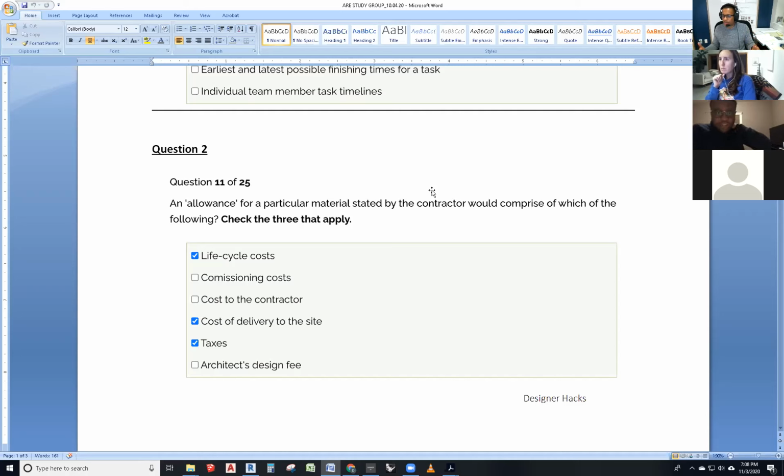Lauren, do you mind explaining the difference now that you're on that, with contingencies? So contingency is something that's added onto the project budget or onto the contract for unforeseen conditions and things that you just don't know, because projects are very complex. It's typically 10% of the total project cost. You can put 10, 15, 20%. So if the project is a million, you get 10% of the million set aside. It's not a million plus 10%.